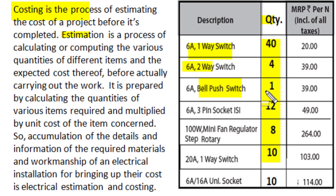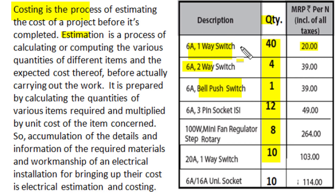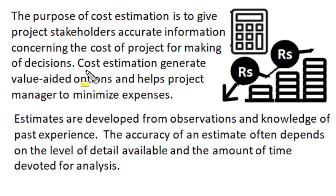Costing becomes simple — we just multiply item cost with quantity and sum up all the items. So we can say the accumulation of detail of required material and workmanship for execution of any electrical installation, so as to obtain the cost of the project, is called electrical estimation and costing.